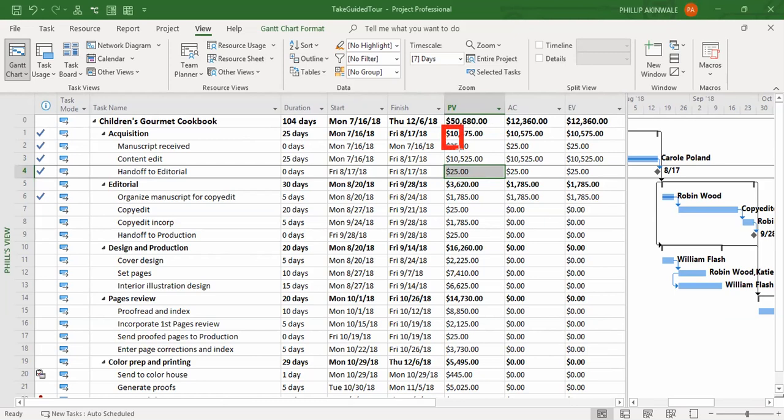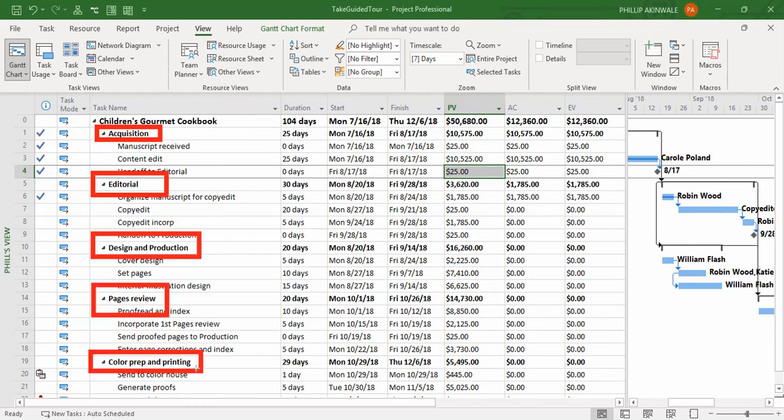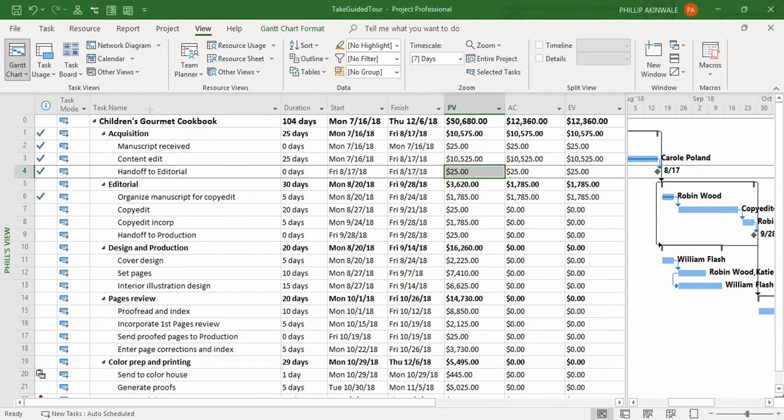But the cumulative spend, when you add up the parent tasks, so if you add up this, plus this, plus this, plus this, plus this, which you could say are the budgeted costs of work scheduled over the entire duration of the project, right? When you add those up, you're going to get your budget at completion. So if you really wanted to be specific, this top value here is your BAC, and everything else that falls under it at one level or another, that's all your planned values. Okay, so you get your budget at completion, and then you just manage it.